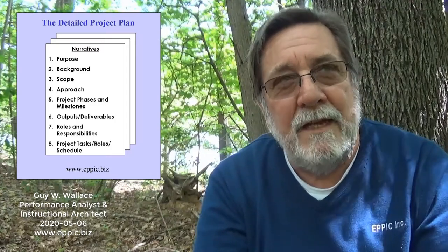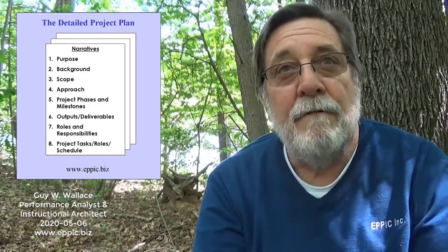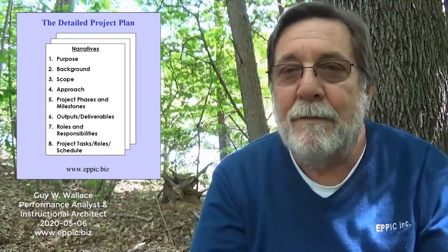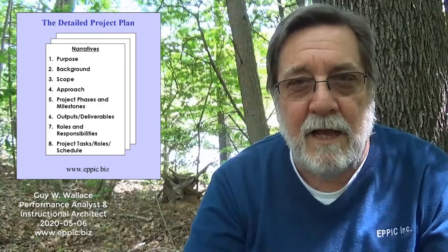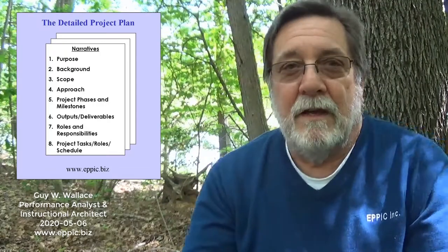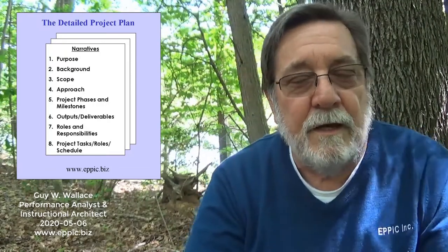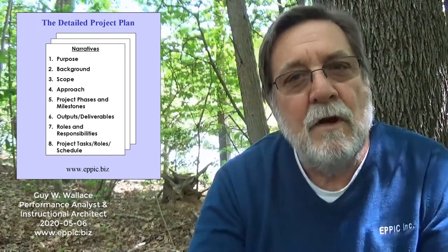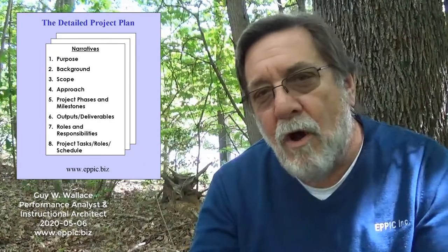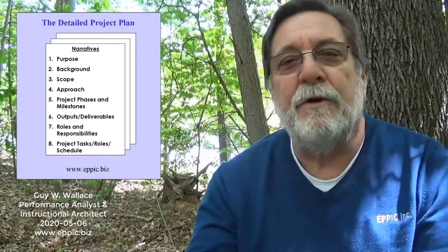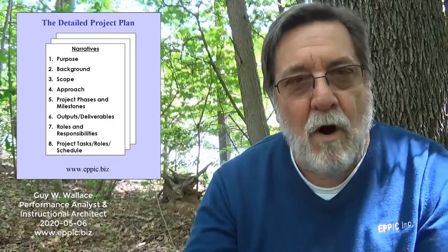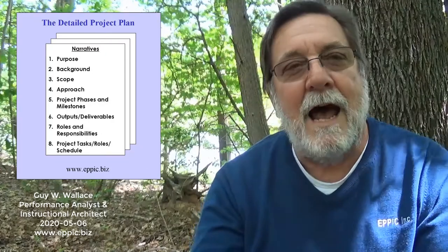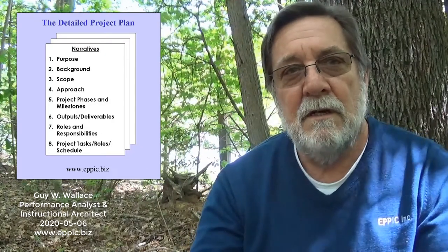But so detailed project planning allowed me to fix fee price my projects. And many times I would do a preliminary plan on the whiteboard of my client's office after having an appropriate amount of discussion, which we'll get to in a little bit. And then I could price out all the touch time per my six phases, per all the outputs that needed to be produced, per all the tasks that were part of all of those outputs. And I could show my clients that here is my time and expense costs.